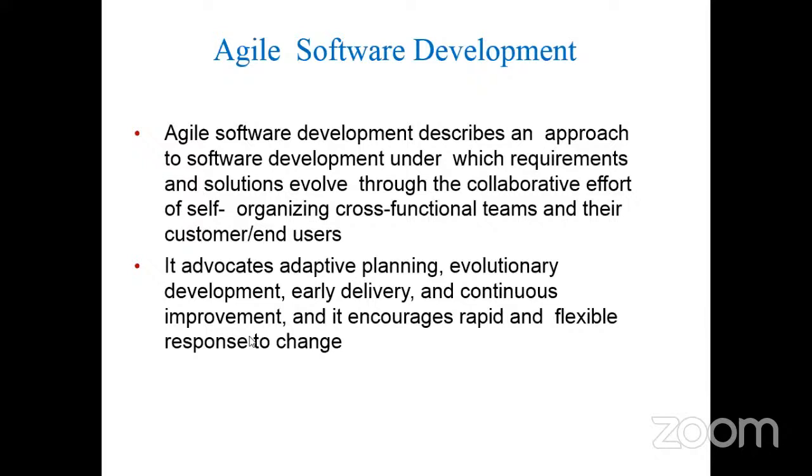Agile is flexible, faster. That means the obsolete waterfall model is not yielding better results. When requirements come in during the design phase or coding phase, you still take those requirements into consideration, and you are going to satisfy the customer. Changes are inevitable, and when the customer brings out those changes, you have to take them into consideration. You start developing in iterations and increments. Every 1 month or every 2 months you show some result to the customer by following an incremental and iterative methodology.